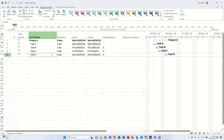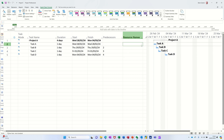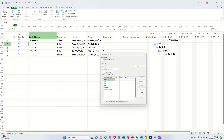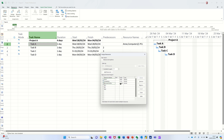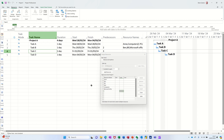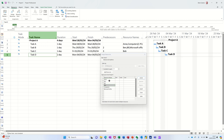If I go back to the Gantt chart and start allocating people to tasks — one way is the list where you can just tick people on. But what I tend to do is go up to the resource tab, assign resources. This box just floats, so whichever task I click on it tells me what it is. I'll assign Ann to the first task, give her a computer and one license — and there's a cost. Coming down to the next one I'm going to assign Bill and Ben, give them two licenses and two PCs. Then I'll just get Bob to do the next one — he doesn't need a computer. And then the last one I'll get Ann to do again.